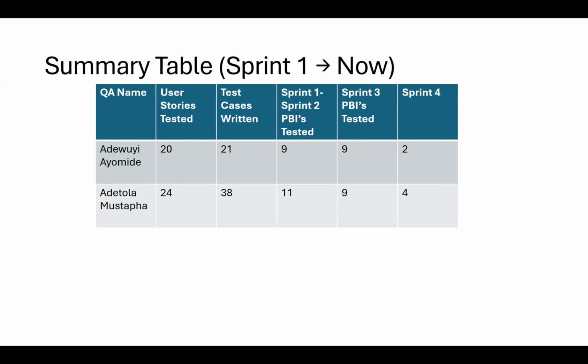For sprint 1 and 2, we could not meet the objective of sprint 1, so some were carried over into sprint 2. That's why we have those numbers of 9 and 11. And for the current sprint, which should be sprint 3, we just have few product backlog items to work on, because it's just about security and account management. Can you go to the next one, please?